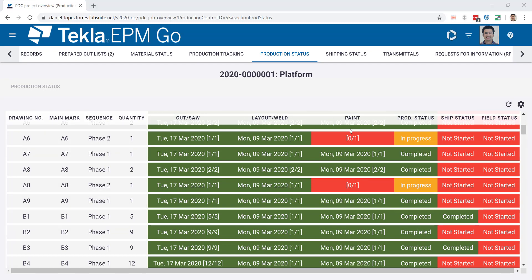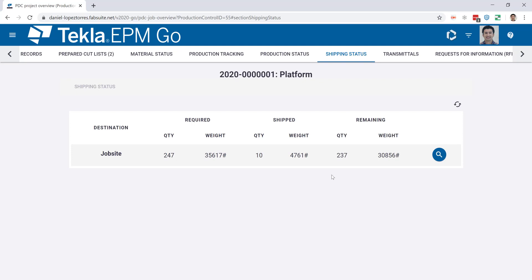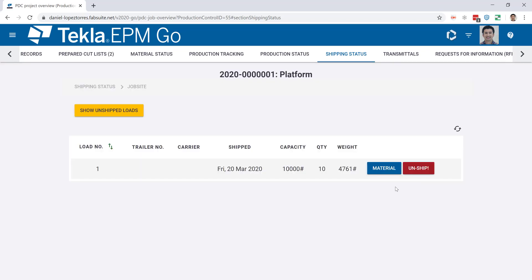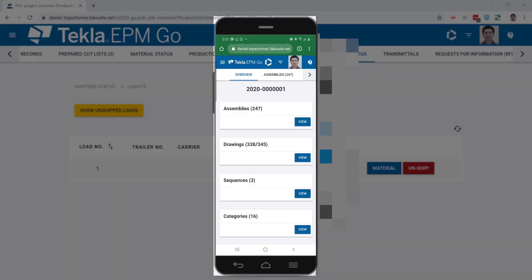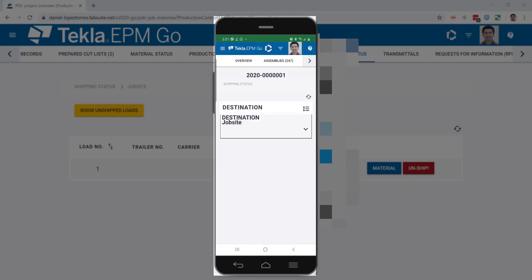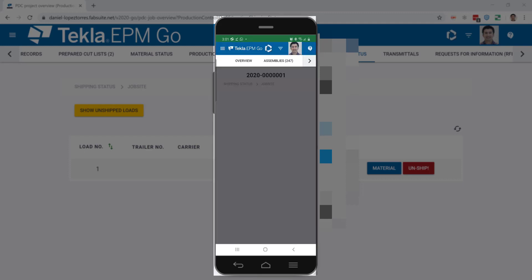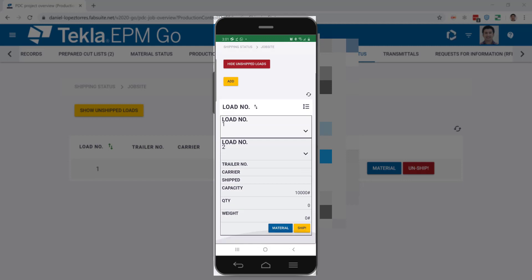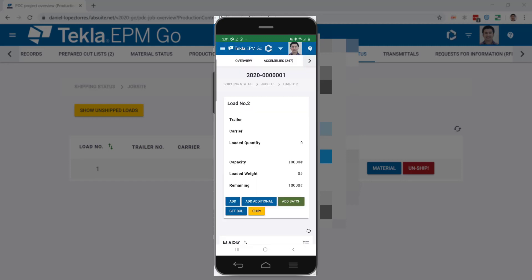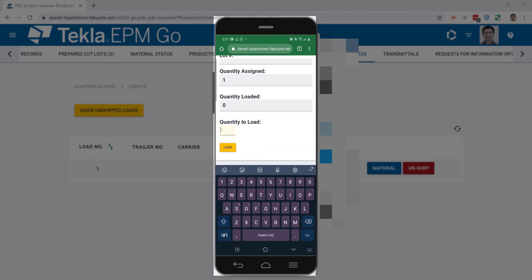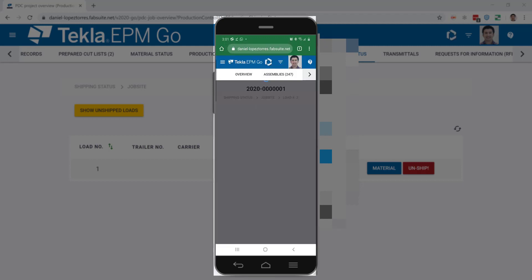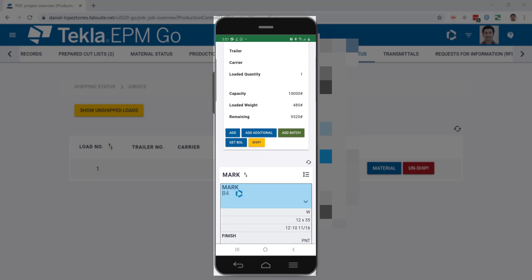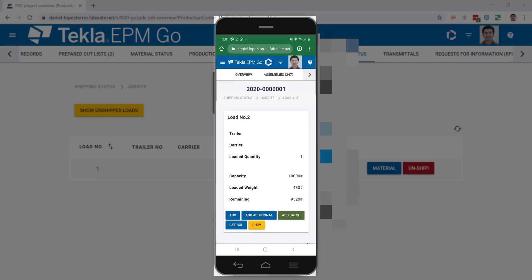So lastly, the shipping status feature allows you to be side by side of the truck with a tablet, creating a shipping ticket on the fly or based on a preset list from the project management area. This avoids tons of mistakes. I know what it is to receive napkins as a shipping draft ticket and try to guess the main marks that are written down there, and that produces several mistakes. By actually using the bill of material as the base of your shipping tickets and just being able to select from it the main mark that you're actually putting into the truck, you will close the gap and trust your tickets more and more every day.